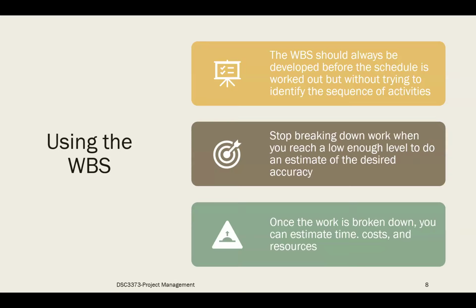You need to stop breaking down work when you reach a low enough level where you can do an accurate estimate of the cost as well as the time. Once you have broken down the work, you can estimate the time, cost, and resources needed for every work package or every task that you identified.